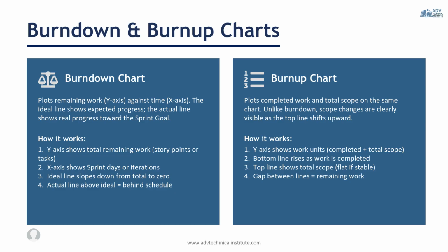The key difference is that burn down charts track remaining work, while burn up charts track completed work and make scope changes visible. For the PMP exam, remember that burn up charts provide better visibility when requirements or scope change during a project. Your PMP tip: burn down equals remaining work, burn up equals completed work plus scope changes. That's usually all students need to remember to answer the PMP exam questions correctly.